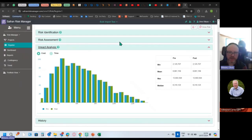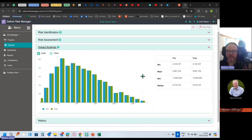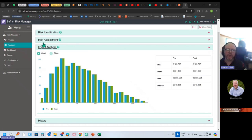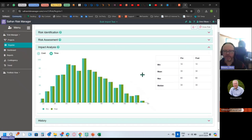All of those risk assessments feed down into a cumulative impact distribution here where you can see them in the mean max. If you've got multiple cost impacts or multiple time impacts, switch between those to see how that's coming through.